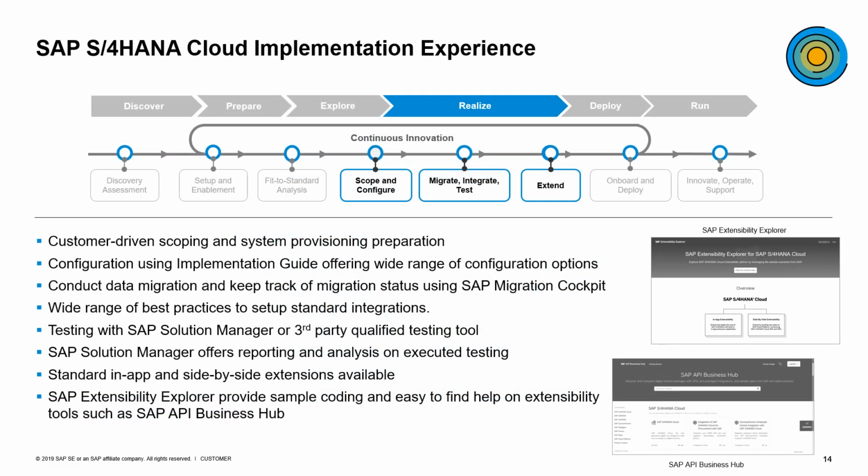The realize phase is where the majority of the work related to scope, configuration, migration, integration, test functionality, as well as extending the solution for the customers will occur. Based upon the outcomes of the Fit to Standard workshops, the project team will have a better idea of what the customer requirements are in terms of scoping and system provisioning.